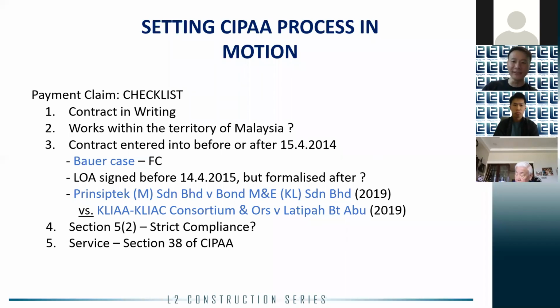Otherwise, don't take the risk. Just follow the modes of service as set out clearly in Section 38, which would include service by registered post, or leaving a copy at the last known address, or serving it by hand within office hours.